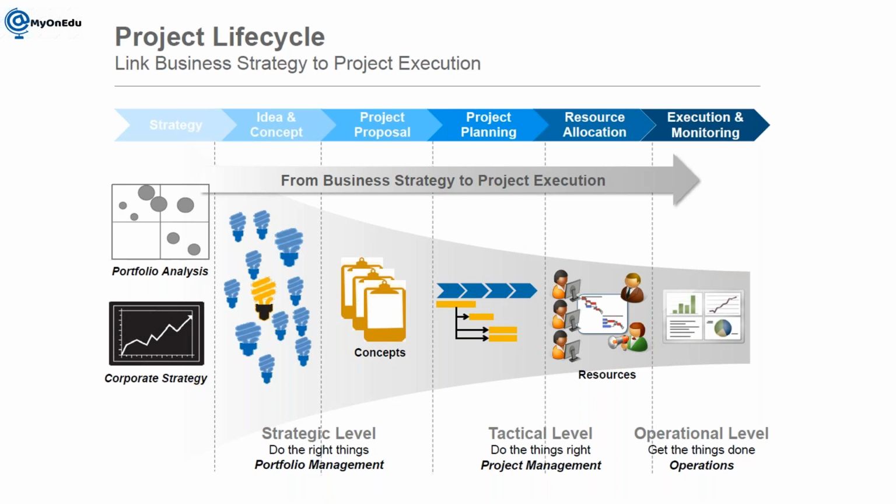And then you are preparing a JD, job description. I need 5 years of industry experience in the relevant area for the integration manager, this is your JD. So here you have qualification, and plus you need to define your location, okay. I am executing this project at Delhi location. And then third, I need this resource from January to April, right?